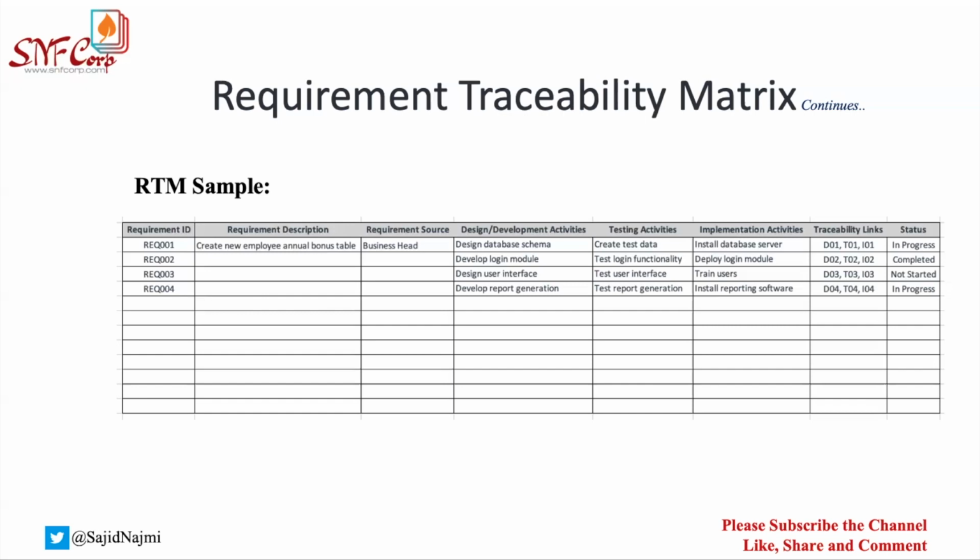This will give you all 500 details, and you have to go ahead and read 500 sections to figure out what you need. This will be a mess for you. So you should always try to create unique numbers. Don't repeat them. One ID for one requirement for one reference, so that this will be easy for you.